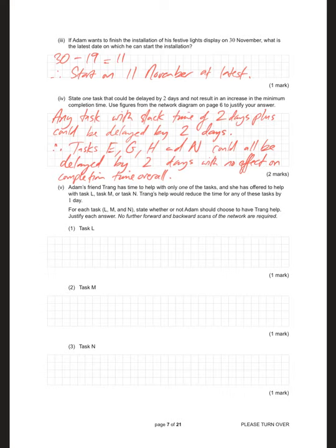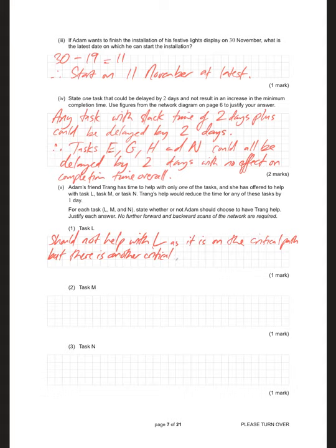Task L. Should not help with L as it is on the critical path, but there is another critical path that L isn't on.